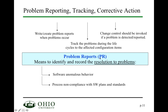If you have problem reports like that, you need to track these throughout the life cycle, so you can establish if they have been implemented and approved and can be closed. Of course, when a problem has been detected, you need to invoke change control.